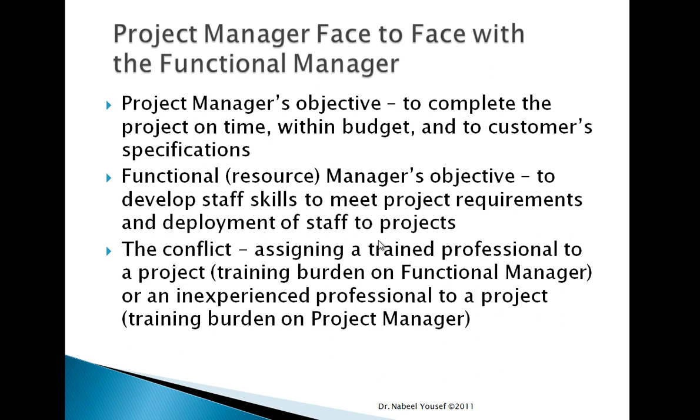While in some strong matrix organizations, or what they call projectized, maybe it's not a real name, but it's being used in project management, as if it's a project-oriented organization, in this case, the project manager will have full authority, and he should actually be available full-time to control the project.